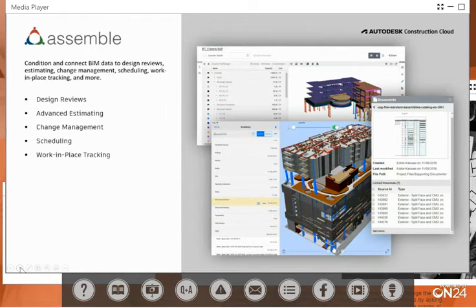And so you can get this really cool visualization of the model in all these different color coordinated aspects related to their status. And you can very easily identify, okay, maybe we're entirely done with the first floor at this point. Everything's green, everything's closed out, and now we're moving on to the second floor. Really good way to just track that progress as the project continues.